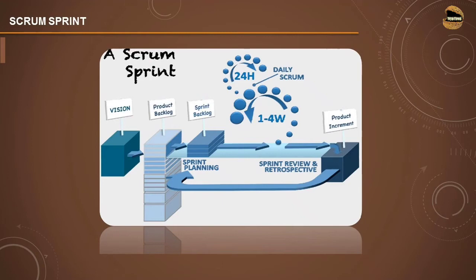Once you complete that, the sprint review and retrospective is another activity which happens at the end. We will be talking in more detail about sprint review and retrospective — the closure activities of the sprint — to understand lessons learned and common mistakes to avoid in the next sprint. Once done with the sprint, you pick up the next sprint and take the remaining tasks from the product backlog, picking another set of activities to put on the sprint backlog.